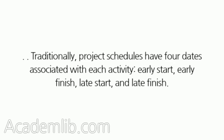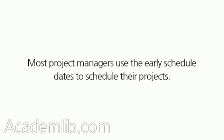Traditionally, project schedules have four dates associated with each activity: early start, early finish, late start, and late finish. Most project managers use the early schedule dates to schedule their projects.